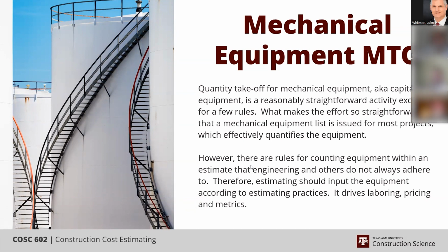Except that what I'm used to from that standpoint is, I think I understand what you're talking about. I've looked at mechanical building construction two different ways. One is per square foot. So you're assuming we've got a building at $350 per square foot, and that accounts for everything: HVAC, water heaters, plumbing, everything. That's one way to approach it.